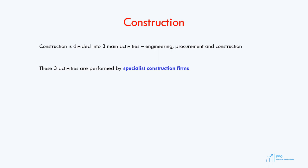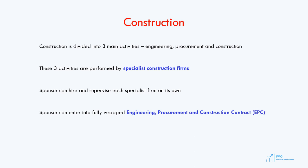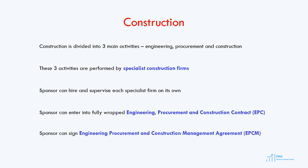There are three alternatives for the sponsor to carry out the construction contracts. First, the sponsor can hire and supervise each specialist firm on its own. Another alternative is to enter into an engineering, procurement, and construction contract with an EPC firm. And finally, what we usually see in the mining industry is that the sponsor enters into an engineering, procurement, and construction management agreement, or EPCM agreement, with the EPCM firm. The first alternative is not a popular option in project finance transactions. So let's review the differences between the EPC and EPCM contracts now.